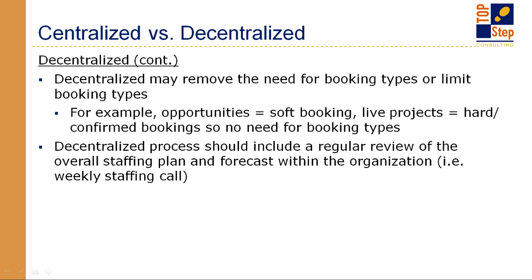The big thing about using the booking grid is that it doesn't allow you to easily use booking types. So if your organization is looking to use booking types, like considering a project that maybe isn't signed yet as a soft booking, or a project that's already gone live and is approved as a hard booking, something of that nature, then instead maybe you can look at project stages instead of booking types if you're using the booking grid. And I will show everyone that.